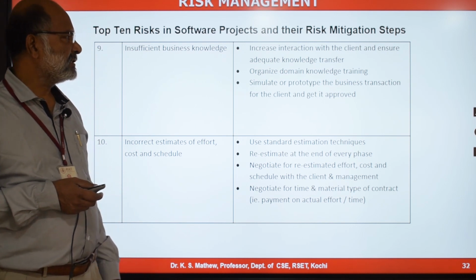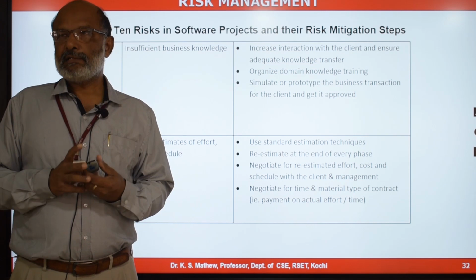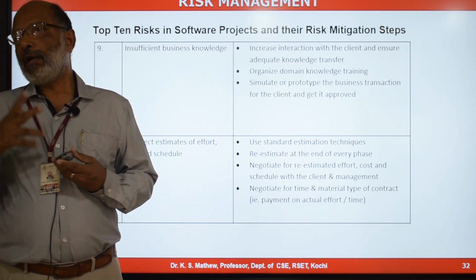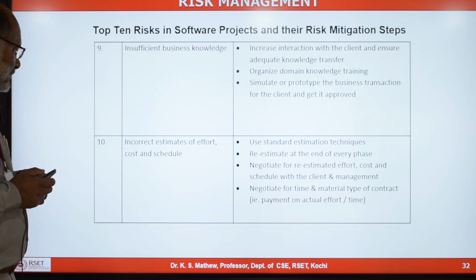Simulate or prototype the business transaction for the client and get it approved. You can also prototype some of the business transactions and show the prototype to the client, get it reviewed, and based on that you can get clarity on the business domain knowledge.